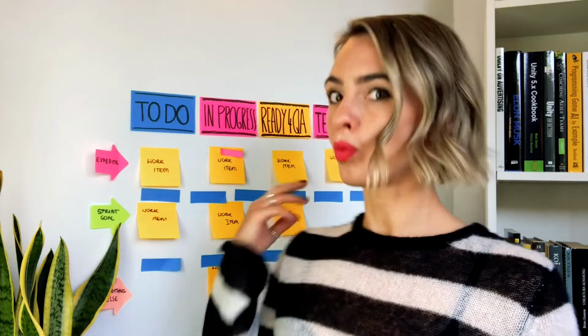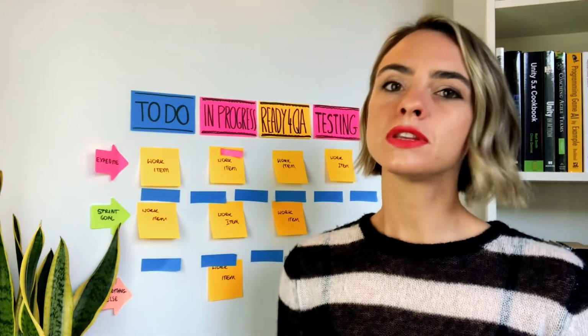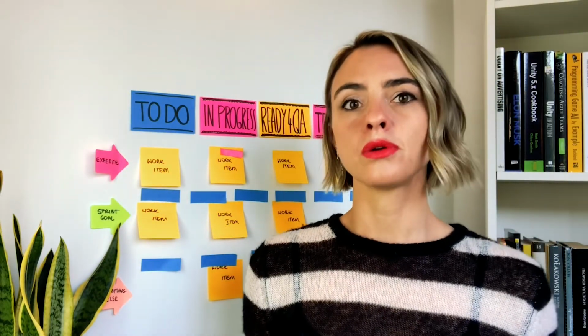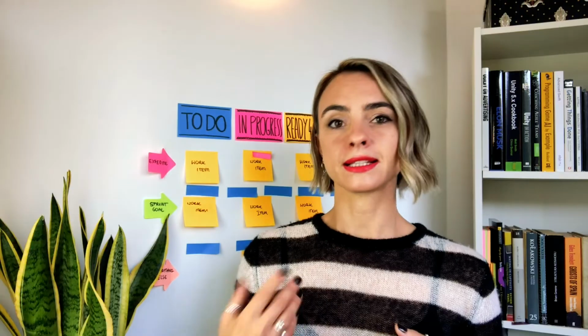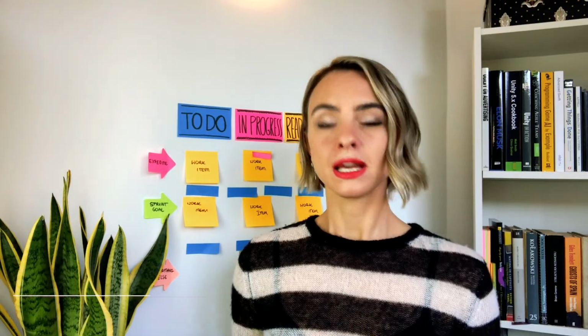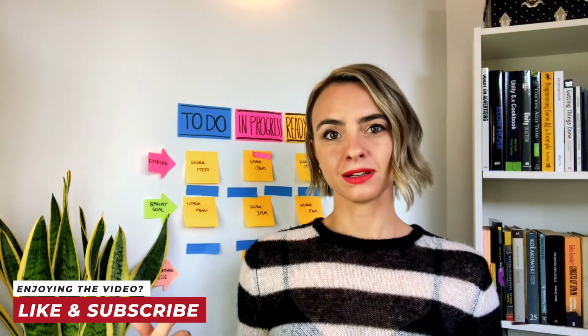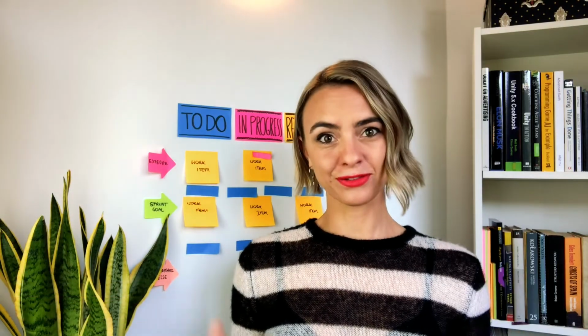I recommend walking the board if the team clearly struggles with the classical 3 questions. The symptom of that would be that the dailies take forever and the team members don't pay attention to each other, waiting for their turn only. Experiment, evaluate, and decide if you want to keep it or keep iterating until you find your best fit.